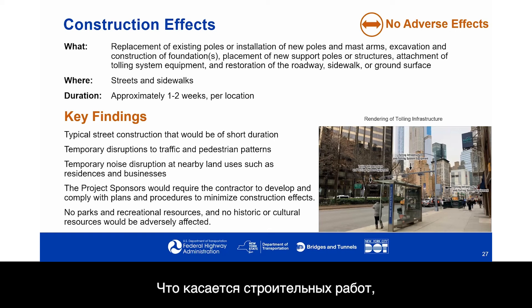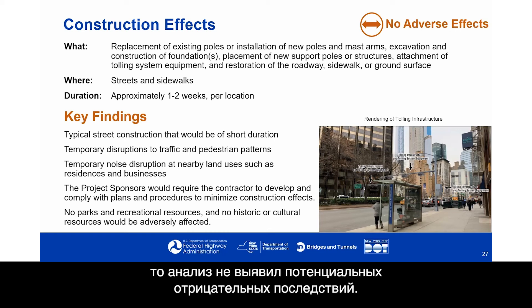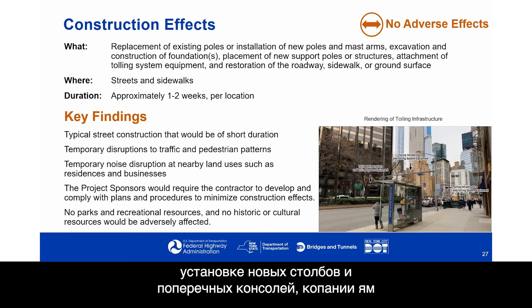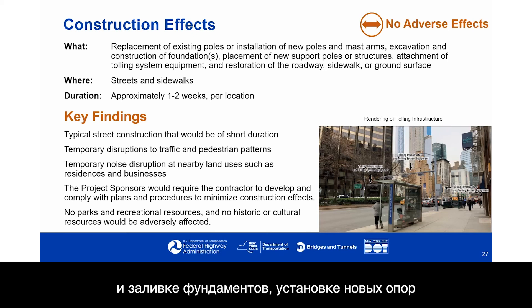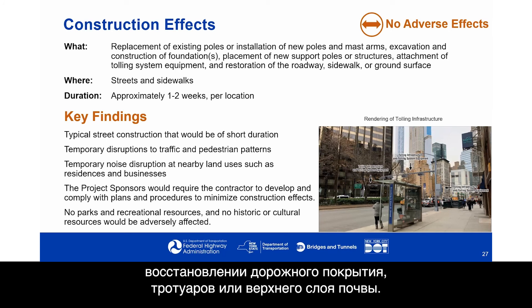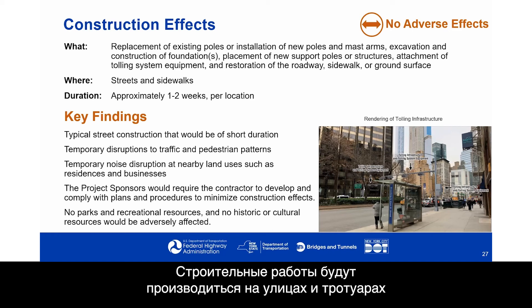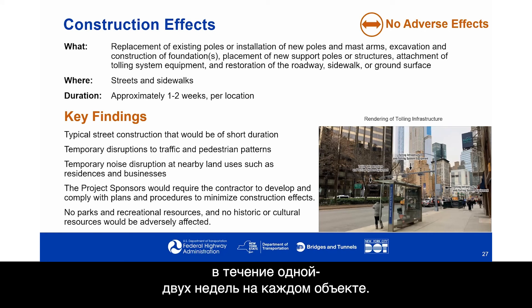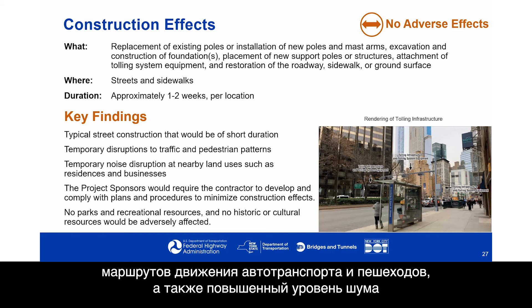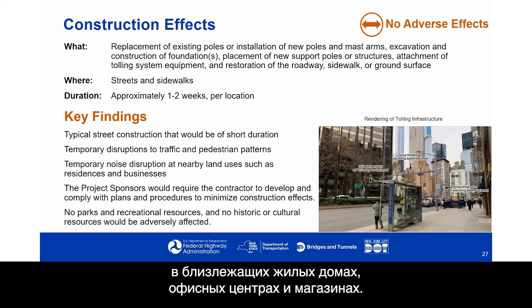With respect to construction effects, no adverse effects were found. Construction would consist of replacement or installation of new poles and mast arms, excavation and construction of foundations, placement of new support poles or structures, attachment of tolling system equipment, and restoration of the roadway, sidewalk, or ground surface. Construction would occur on streets and sidewalks and take approximately one to two weeks per location. During this time, there would be temporary disruptions to traffic and pedestrian patterns and temporary noise disruptions at nearby residences and businesses.